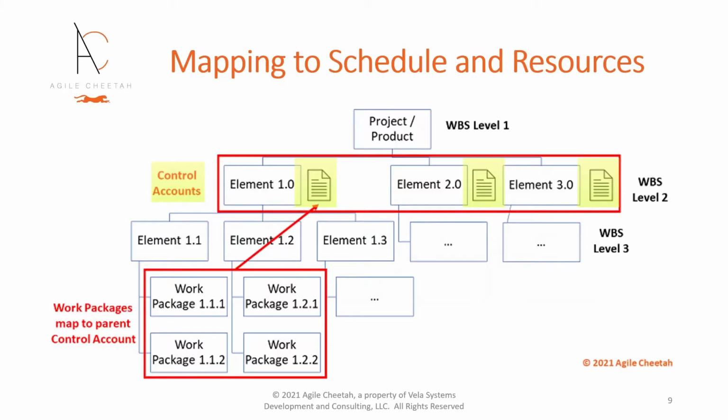Work packages map project scope, deliverables, and activities to project schedule. A work package includes scheduled activities and milestones needed to complete the associated deliverable or work element/component. In turn, control accounts map work packages to project budget, facilitate the roll-up of activities and milestones into an integrated schedule, and allow planners to assign specific resources, such as people, to specific elements of the WBS hierarchy.